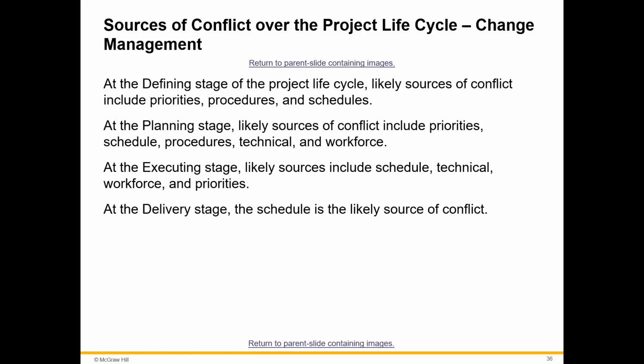Okay, the goal for a project manager is to take a functional conflict, tell them what the problem is, and try to fix it as much as you can, so that the problem doesn't turn later on into a dysfunctional conflict. And in dysfunctional conflict, there will be a lot of resentment. In the case of Ajax, it turned out that people understood that there was a pay difference here. Could you control it? Not really. Okay, but the pay wasn't the problem; it was the bonuses.